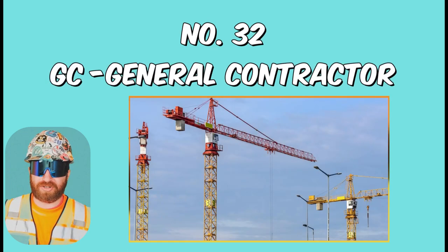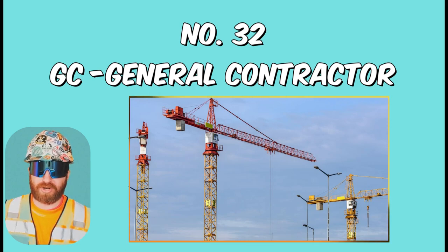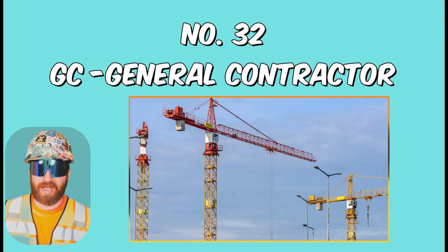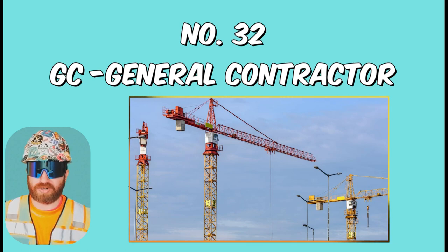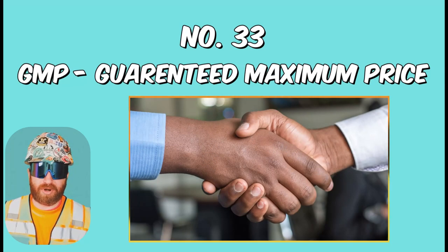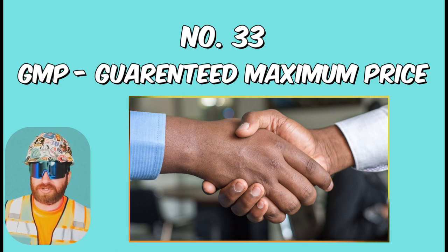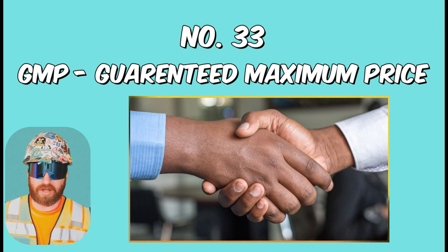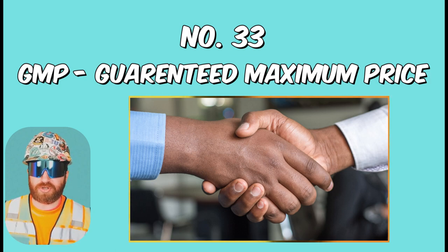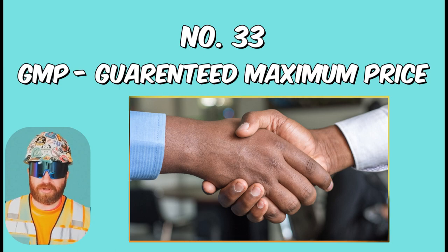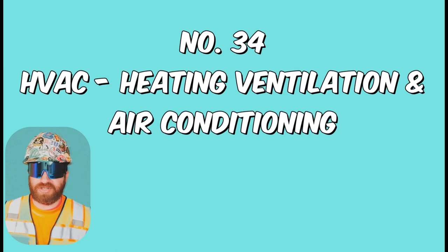GC, or General Contractor, is the main or prime contractor responsible for the oversight of construction. They may have both self-perform work and subcontractors working for them. Guaranteed Maximum Price is a type of owner-contractor agreement in which the dollar amount reflects the highest amount of labor, materials, and profit a contractor can charge. If there is a scope increase or decrease, your total GMP value can actually go up or down based on that.